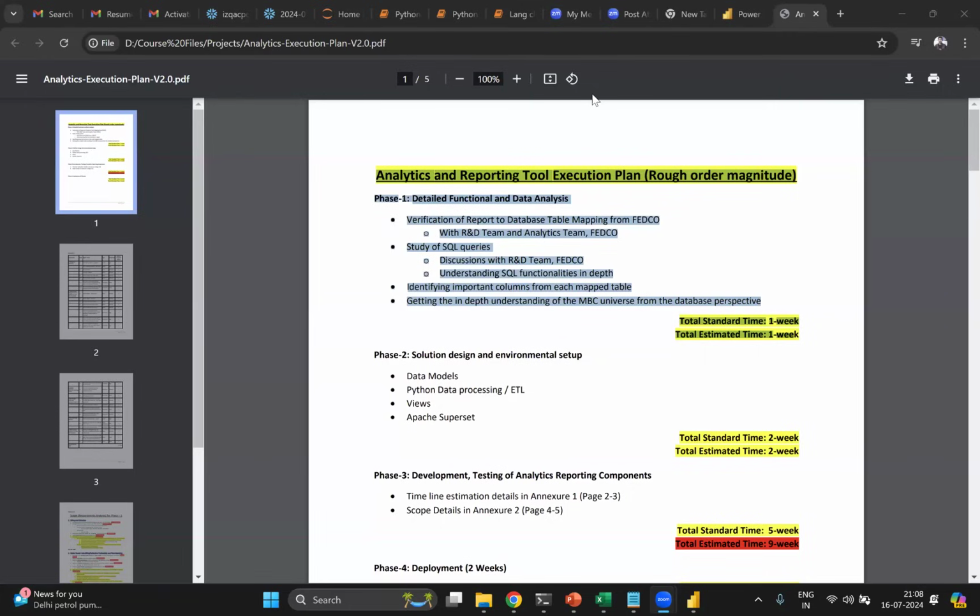So now you may do Python cleaning one day. For example, if Aquila is my resource, for our client we say Aquila is working 100% on, let's say, XYZ hospitals. We say Aquila is working on that client 100%, but we will be using Aquila for other projects as well. Why? Because we will for sure have a lot of time. That's what the profit of an analytical or service company is. So we use Aquila's resource for multiple projects. We give one project on the hospital and we give another client.